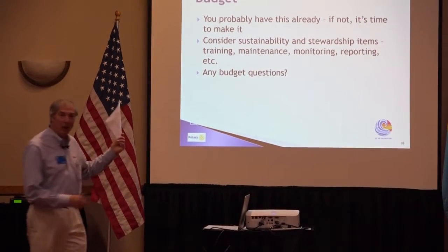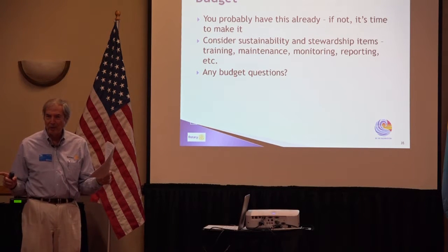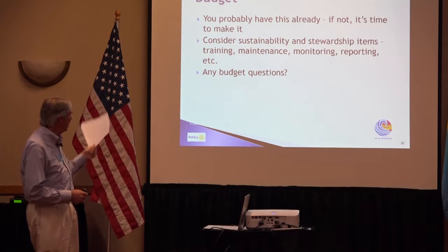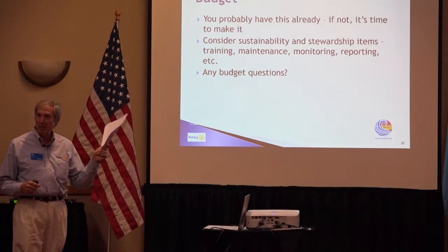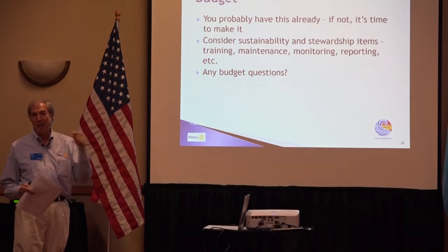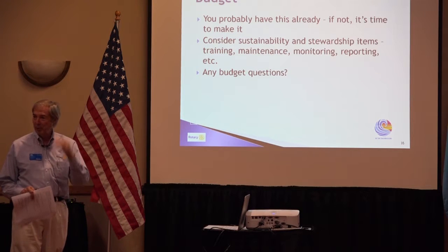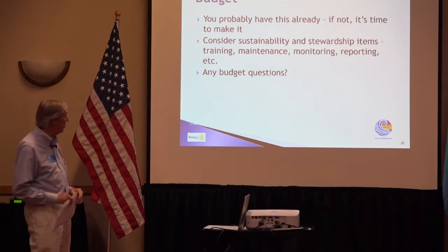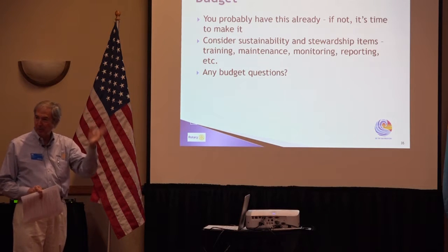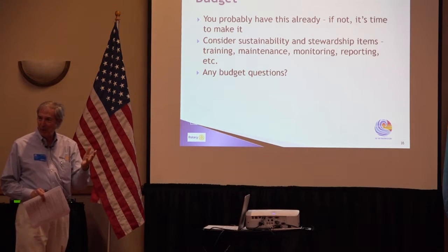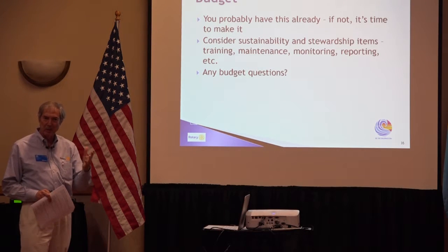Okay, budget. You have to have a budget. I think everybody knows how to do a budget, but you have to have one. At this point, you need to go through it pretty carefully. You need to consider sustainability and stewardship, because there may be things you need to put on your budget that you wouldn't have put if you were just putting down equipment for your well or your latrines or whatever it is you're doing. So consider all of that stuff: the training, maintenance, monitoring. How are you going to have spare parts and all of that sort of stuff available?